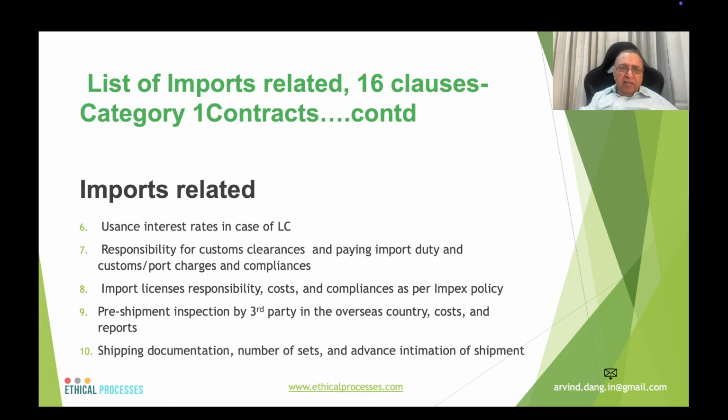Responsibility for custom clearance and paying import duty and custom port charges and compliances, who will bear that. Import license responsibility, costs and compliances as per EXIM policy, if the import licenses are applicable, if these are not under open general license. Pre-shipment inspection by the third party in the overseas country, cost and reports, who will bear that.